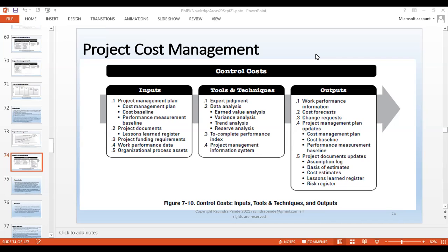And then we have some reserve in case of unforeseen circumstances or some risk which popped up and tries to create obstacles within our executions. We try to use certain reserves, and these are all for unforeseen circumstances. There is a management reserve to help us out. There's a control reserve, which basically helps each and every group utilize some basic reserve which we have created in our planning.